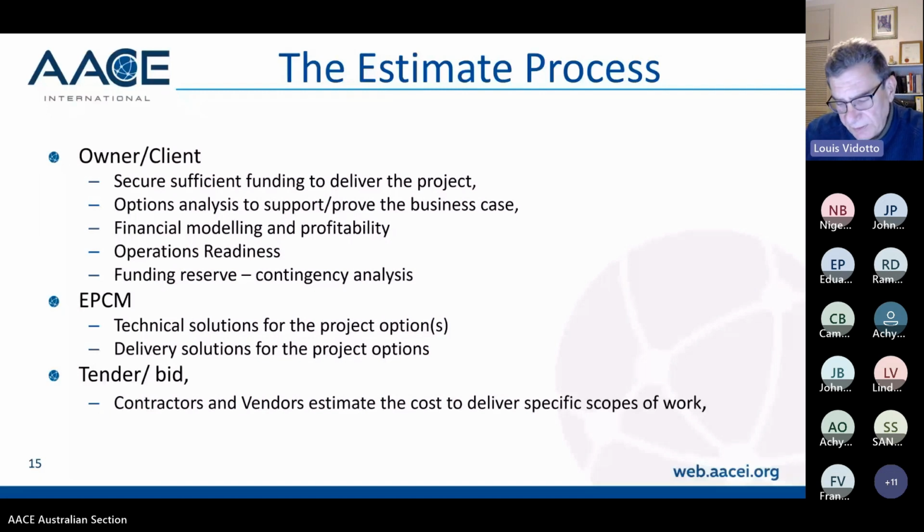And that's certainly something that's sometimes a bit cloudy. When do you actually hand a project over to operations? And then when do you convert from spending capital costs to operating costs? So people say you hand the project over once it's at nameplate, or some companies say once commissioning is complete, you hand it over, which is fine as long as that's defined as part of your estimating process. When do you actually hand over? And then when do you flick from capital cost to operating cost?